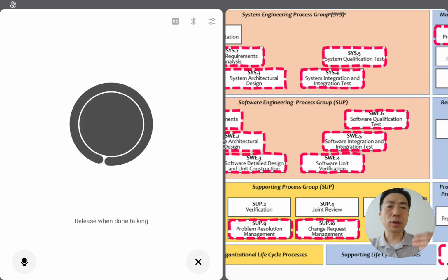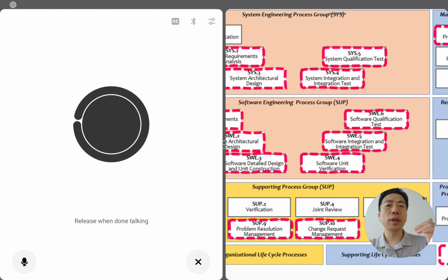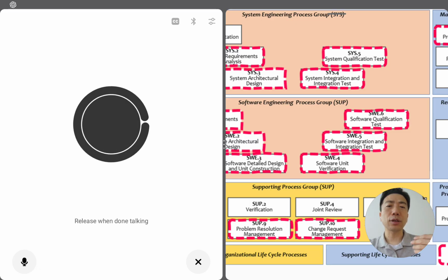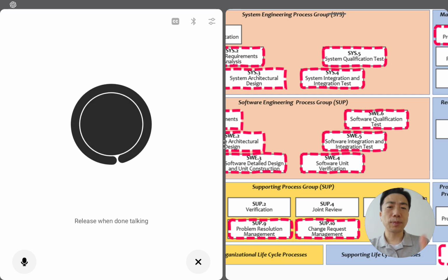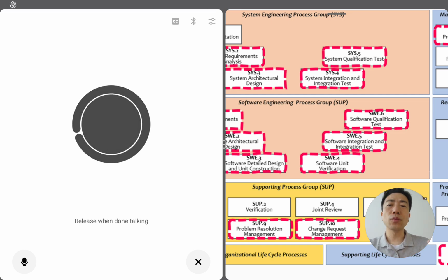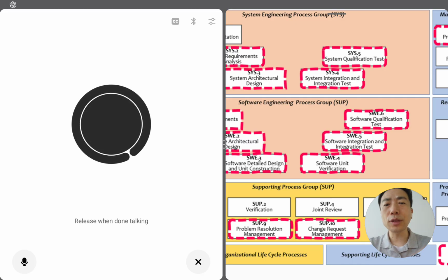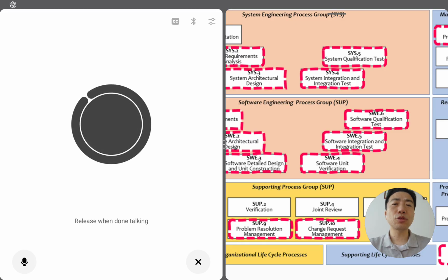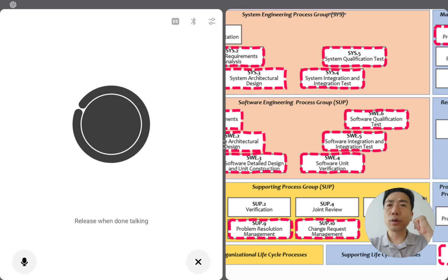Third, the updated work product. The real items changed, like code, drawings, test plans, or documents, all with new version numbers. And finally, the change status report. A list showing open, approved, implemented, and closed CRs.